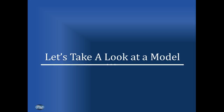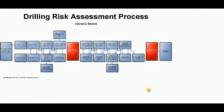So with that, let's take a look at the model. The graphic before you is a drilling risk assessment process, beginning with the formation of the project team through a first gate relatively early in the process, where the initial thinking is: does this meet the requirements the organization has for a risk profile, do we need more data, et cetera? At this point, you can also stop the project. The second gate is further on, and the decision here is go/no-go for the authorization for expenditures, or the AFE. Across the top you see boxes representing the G&G — the geology, geophysics, and petrophysics — information from reservoir knowledge itself that feeds into the system. On the bottom you see the engineering data and information that service companies may provide from their expertise. As we get through this first process, we keep adding more and more data, identifying gaps, and looking at the sensitivities and relationships among these various variables.